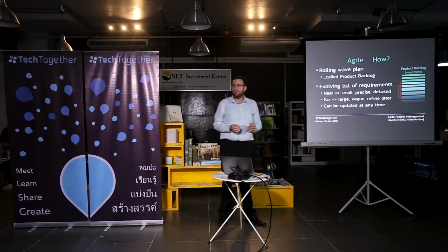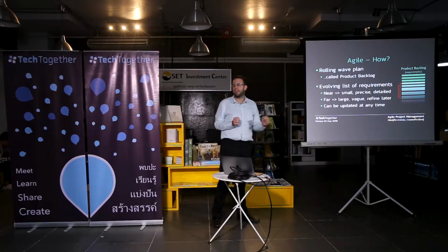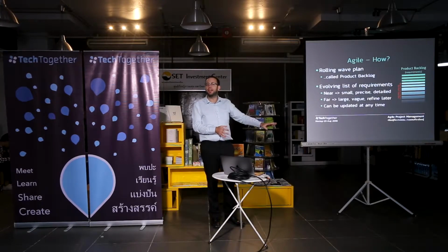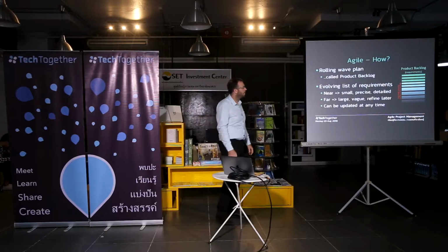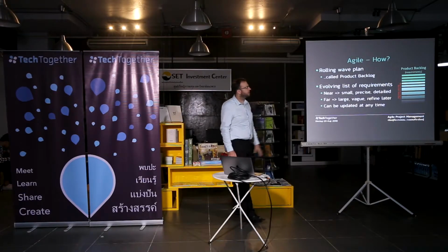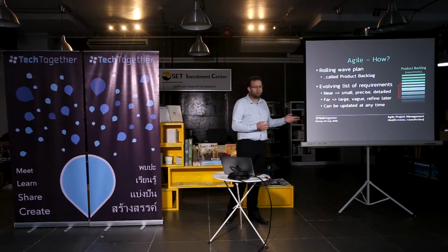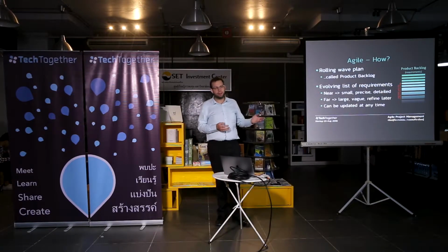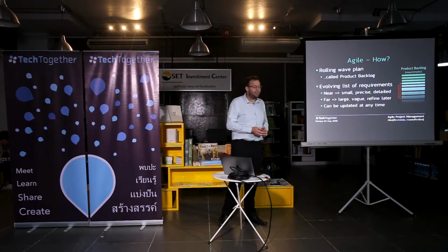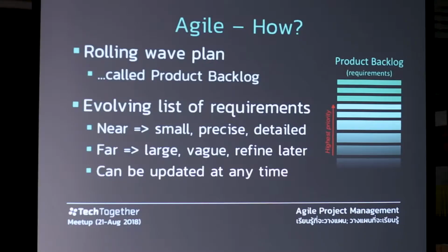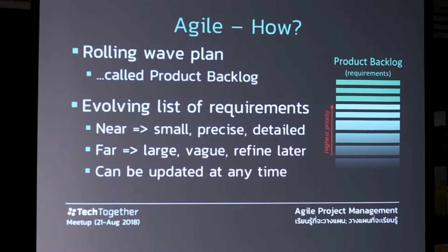It does rely on you having a reasonable idea what is important, what is not. But once you realize something is not urgent, not high priority, you leave it at the back. And maybe you get to it later, maybe you don't. Important part of this is that it's always changing, it's always evolving. So if you have new ideas, new direction, you add them to your backlog, maybe at the top, maybe at the middle. If you decide some of your ideas are not relevant anymore, get rid of them.